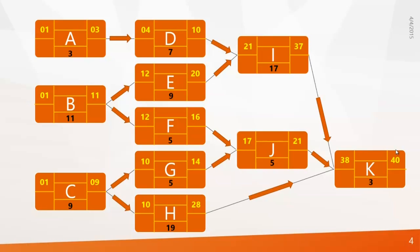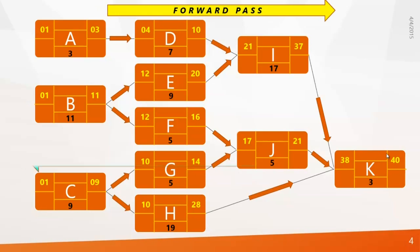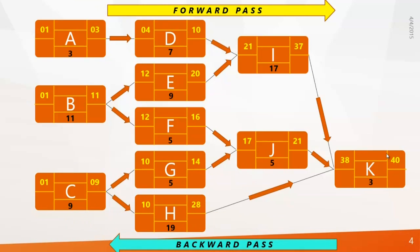Next we need to find out the late start and late finish of all activities. This method is called the backward pass. Let's assume there is no delay in this project and our client wants to finish it in 40 days, so late finish becomes 40 days. Now we calculate everything in reverse order.